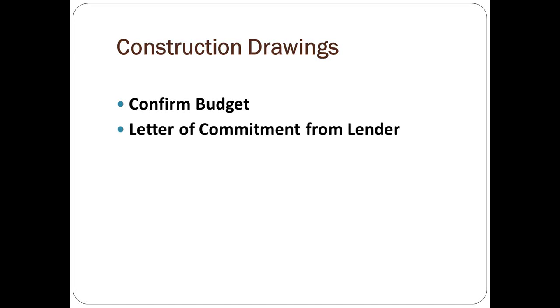Here's what you're going to need. I would tell you, and I've been preaching this to you, get confirmation, verification, and a commitment letter from your lender if you're going to borrow money. Your capital stewardship campaign should have been coming along here as you're moving toward finishing your master plan. Before you release the architect to spend all that money on your construction drawings, you want to know what your pledges are and what percentage of those pledges you believe will come in, are coming in.